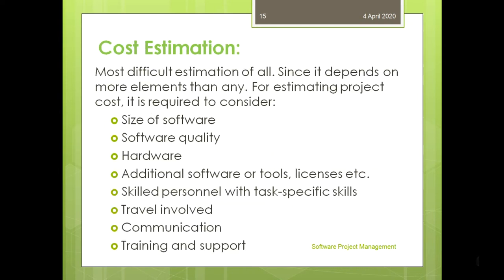Cost estimation: as the name suggests, we will estimate the total cost — the finance needed to complete the project. This is the most difficult estimation of all, since it depends on more estimates than any other. For estimating the project cost, it is required to consider the size of the software, software quality, hardware, additional software or tools, licenses, skilled personnel with task-specific skills, travel involved, communication, training and support, time to complete the project, and many other things.